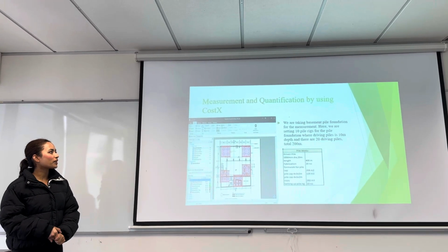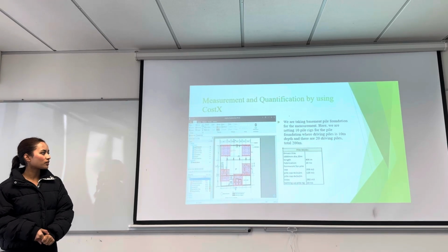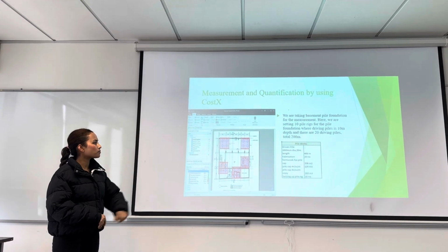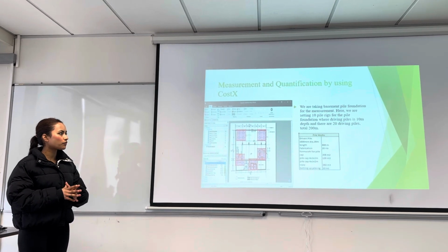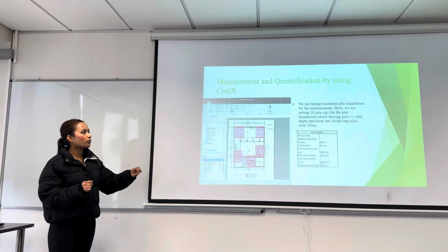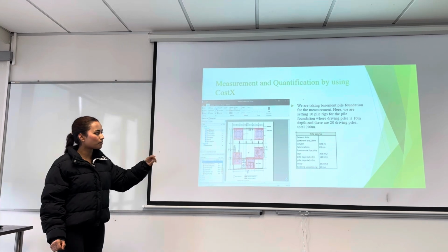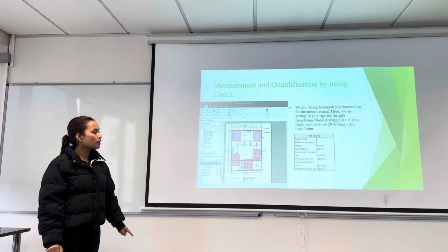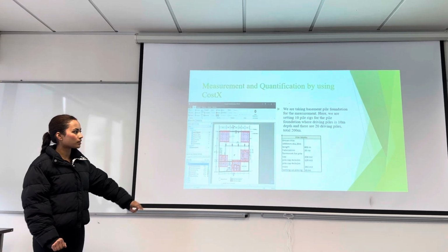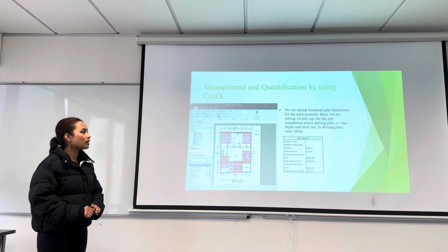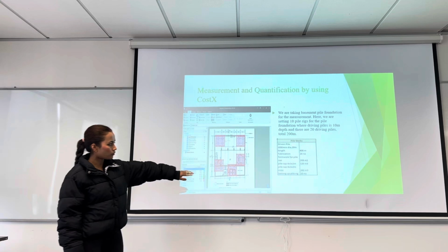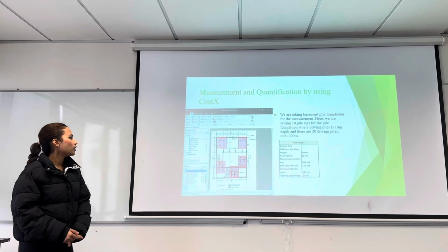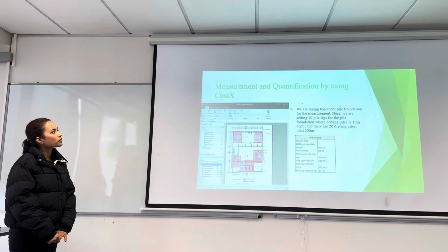Next is the measurement and quantification by using QS6019. The first one is the pile work. We are taking the basement for the pile works, where we are setting 10 pile rigs for the foundation, where the driving piles are 10 meters deep, and there are 20 piles in number.